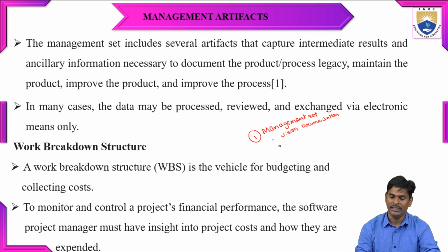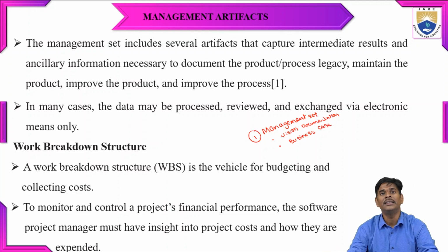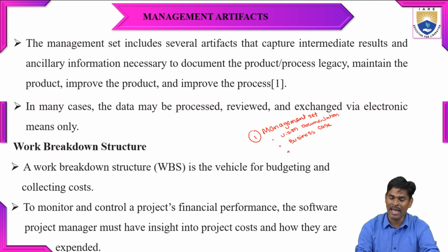Next, while taking up the project, the first thing is they need to verify the business use case. The business case is very important. Here they decide whether to take up this project or not. If they consider this project, what is the profit they are going to achieve? What are the main risks that will arise while considering this project?